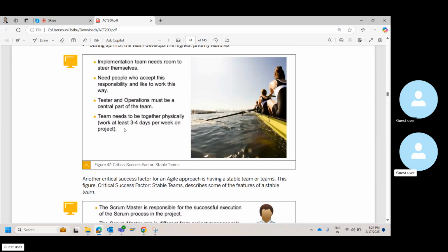So that's the recommendation. You need to always have a stable team, at least until the first level of configuration and solution walkthrough is done. After that, it depends on your organization. If your organization allows, you keep it. Otherwise, you can switch your team with the shadow consultant that you have.